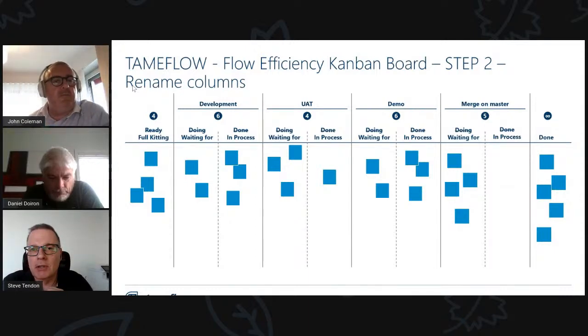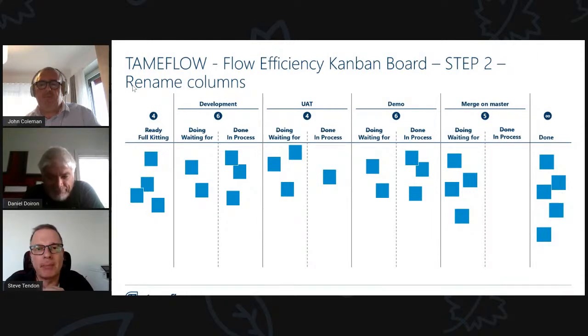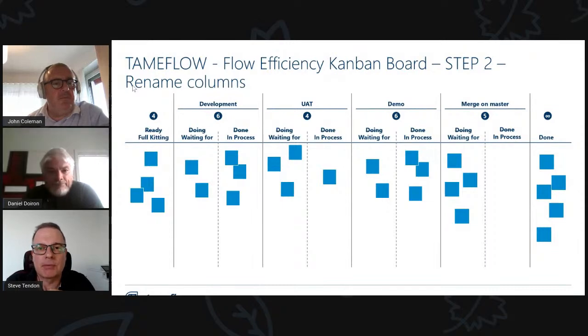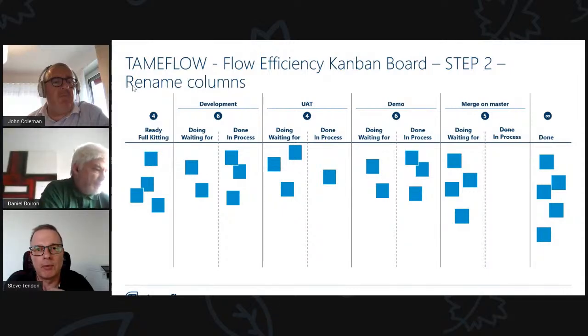So if you're looking at full kitting in this context, where you're seeing a board and that step is at the very beginning, and you might be accustomed to other concepts from Scrum or Kanban, like definition of ready, you would certainly conclude that it is just a synonym of that same definition of ready. In reality, it is not, because the big part of full kitting happens not at the individual team level, but at the portfolio board.